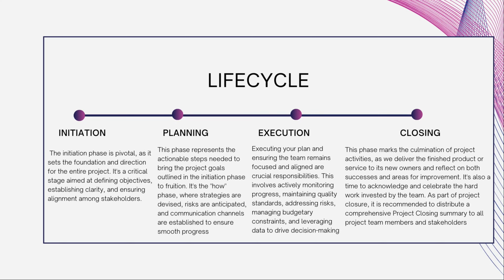And as part of the project closure, we also distribute a comprehensive project closing summary. It could be an email, it could be a document that you share amongst the project team and the stakeholders. And so everyone gets to see what went well, what needs to be improved, where all the documentation is housed, and also if there's any training, all that information is in there for the stakeholders to use even after the project is all said and done and everyone is gone doing different things.